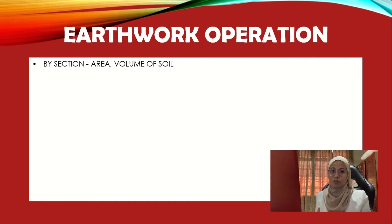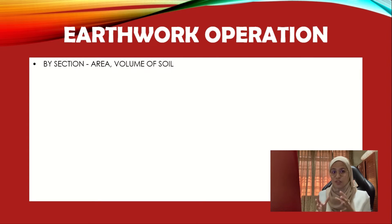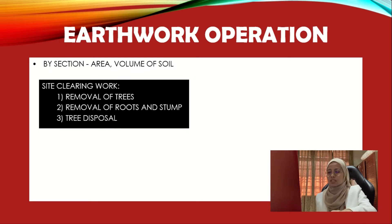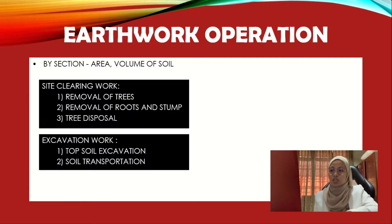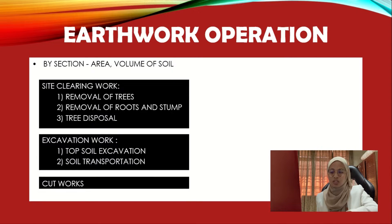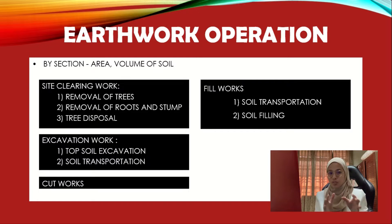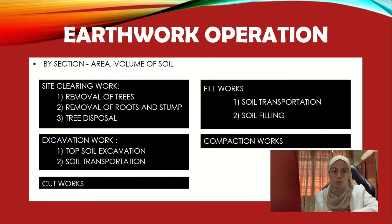For the earthwork operation, it is done by section because each section has different area and different volume of soil. There are five operations: first, site clearing work, which includes removal of trees, roots and stumps, and tree disposal. Second, excavation work, which includes topsoil excavation and soil transportation. Third, cut works. Fourth, fill works, which involves soil transportation and filling to the proposed site. Fifth and lastly, compaction works.